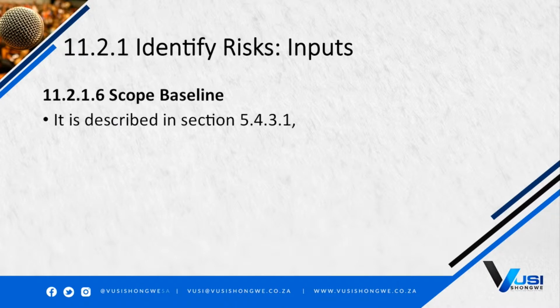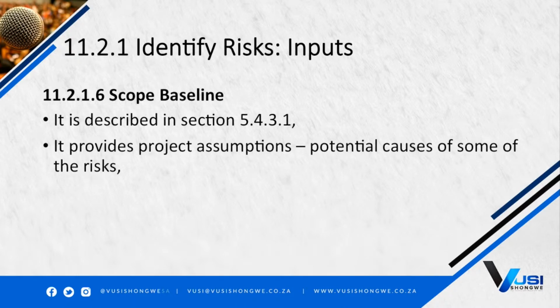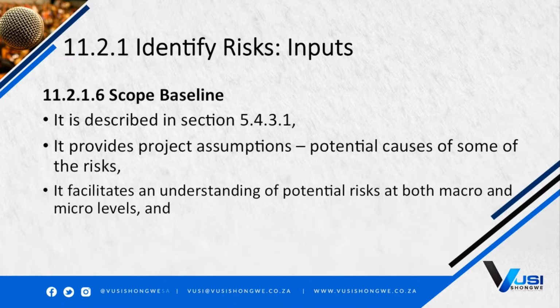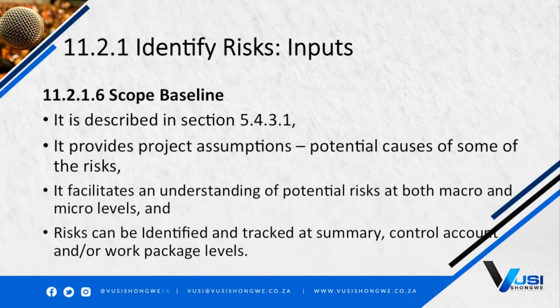Scope baseline. It is described in section 5.4. It provides project assumptions, potential causes of some of the risks. It facilitates an understanding of potential risks at both macro and micro levels, and risks can be identified and tracked at summary, control account, and or work package levels.